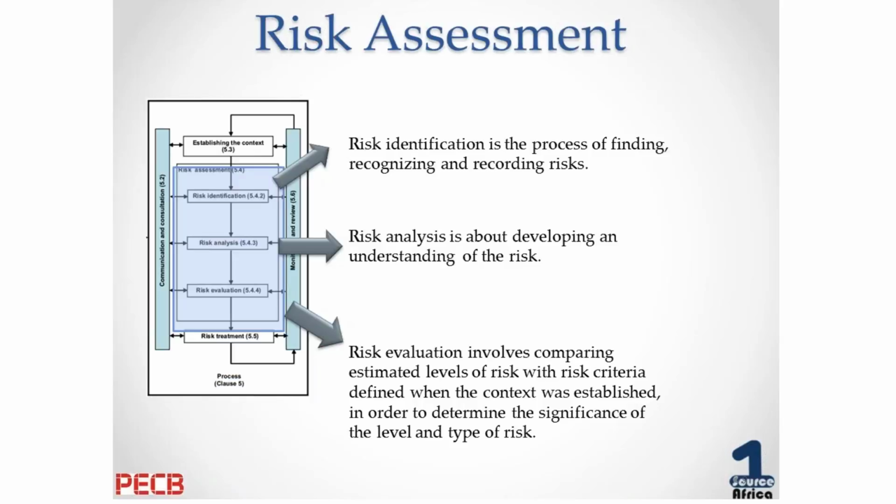The second part of the process is risk analysis, which is all to try and develop our understanding of the risk. Understanding, should the risk occur, what would the impact or consequence be, what is the likelihood of the risk occurring, or probability, taking into account previous occurrences. Has it happened before or not, and if not, what's the chance of it happening. The third thing is then the risk evaluation, which is comparing estimated levels of risk with the risk criteria defined when the context was established.